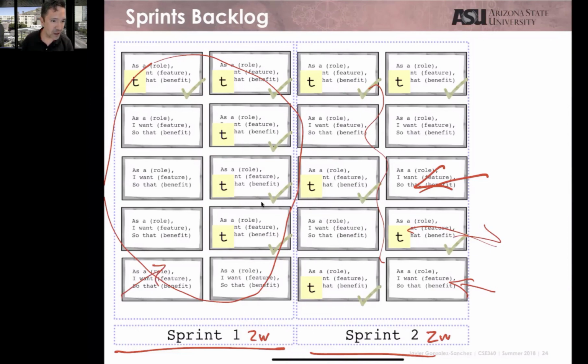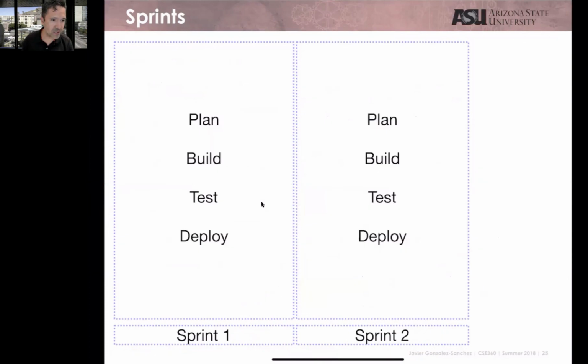But this is what we are planning to do immediately for the next 2 weeks. Sprint backlog. You start with the one, you do the planning, you work, you create your Burndown chart so you can report your advance, you do testing, you do deployment, and that is the end of one sprint. You do a retrospective, and then at some point, you can move to another, and another, and another, and that is the Agile methodology, period.